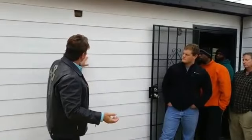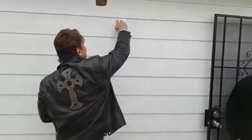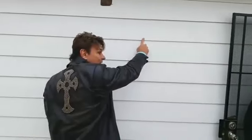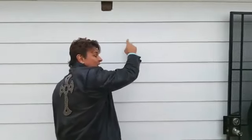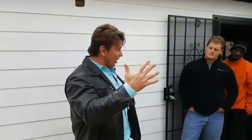Now you're advertising your house as a 2-2 instead of a 3-2. Your other option would have been, here's my second bedroom, now I have to do an addition to make it a 3-2. And those additions are time-consuming. They cost money, and you have to deal with permit stuff. So that's just food for thought.